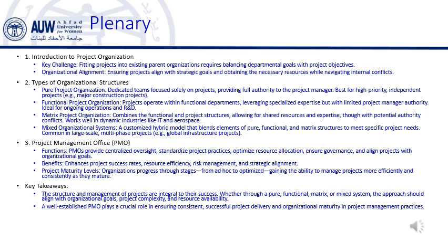Functional project organization. Here, the project is managed within the existing functional departments, and the project manager has less control over resources. This structure is typically used when the project can be broken down into smaller tasks that fit within specific departments.